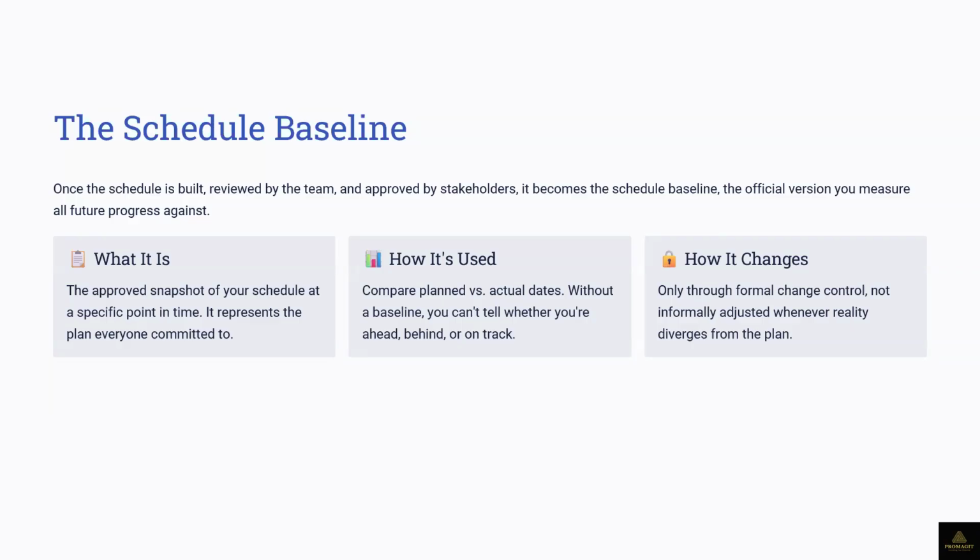But for things like, okay, we are wasting time, things are not working fine, you don't adjust your baseline for those things. Those are the things that really show you your true position. And we are 50%, we are 60% on cost, but we are still 40% completion.